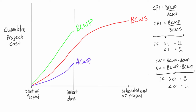For the indices, if either of them is greater than one that's a good thing. For the cost performance index, if it's greater than one you are under budget. If the schedule performance index is greater than one you are ahead of schedule. If they're less than one, that's not good: a CPI less than one means you are over budget, and an SPI less than one means you are behind schedule.